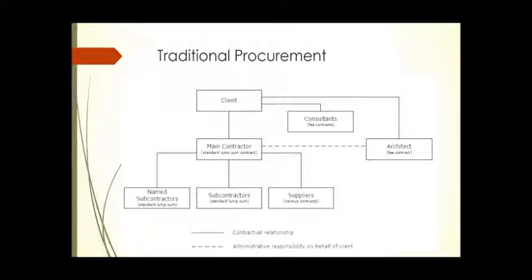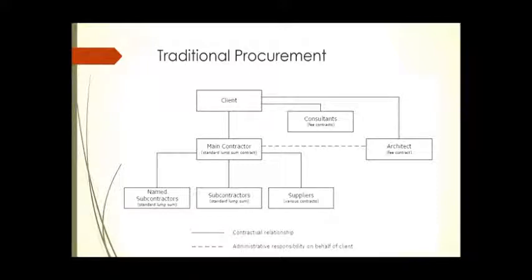The contractor usually cannot go beyond those named subcontractors unless there is a major case — such as they don't want to tender, they are busy, or there is prior history. There is also a third type: nominated subcontractors, where the client nominates subcontractors under the main contract. Under Australian Standard AS2124, you can nominate subcontractors, but under Australian Standard AS4000, you cannot nominate unless you use novation. These are the major relationships you need to understand.